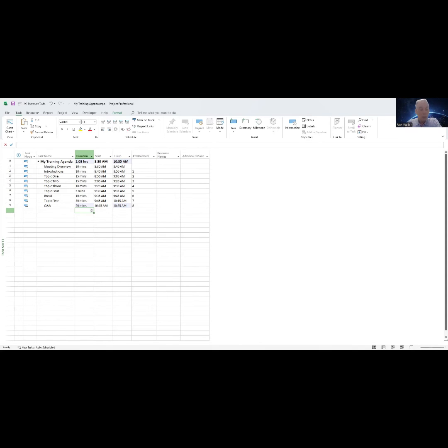But again, our overall duration for this meeting or this training is actually already on the books or calendars for a 2 hour time block. So what we need to do is tweak our schedule a little bit to fit it back in the box. And we really got two options that we could take to do that. One would be to reduce the duration of at least one item, or option two would be to remove an entire item from the meeting, like removing scope.